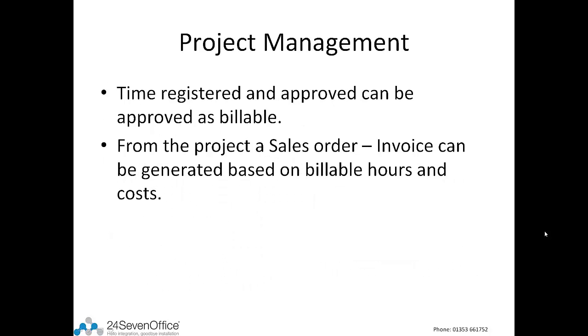Time registered and approved can be approved as billable, so it can be invoiced, and from the project a sales order or invoice can be generated based on the billable hours and costs. This electronic file could, if you so wish, be available to transfer to your account system and an invoice issued from the account system.